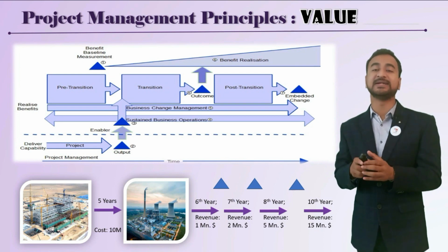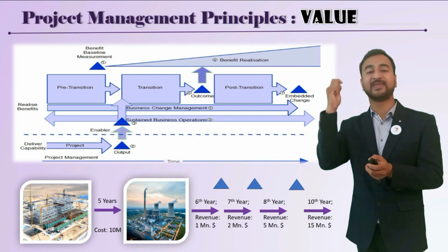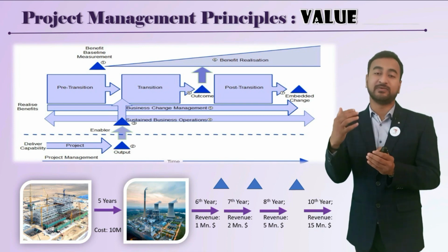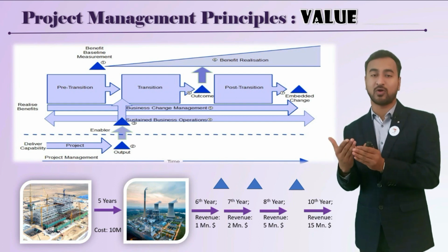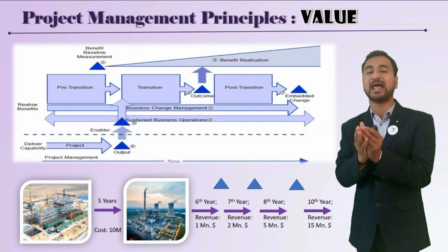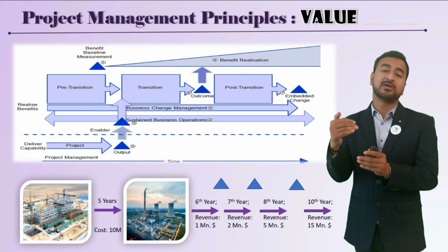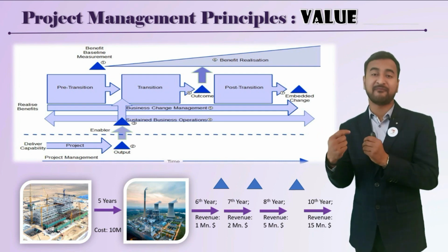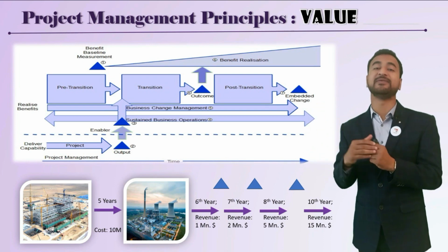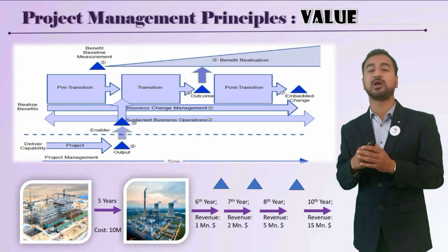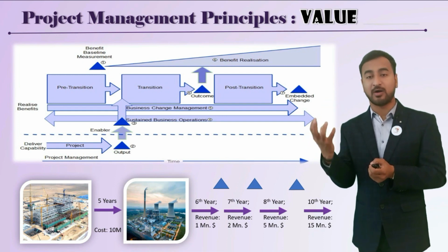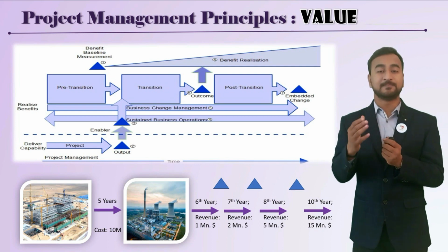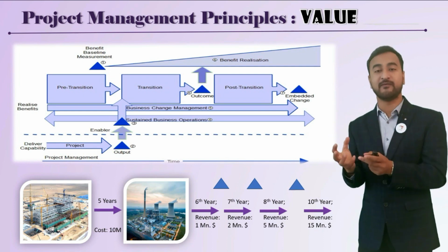As the project manager, it's your responsibility to map that value and measure whether you are achieving that value or not. If you think that you are not aligned with your strategic objective, then without being emotionally attached to the project, you should consult your PMO, and you should stop investing in the project which is no longer achieving that strategic objective or value delivery. So this is the principle: focus on the value.